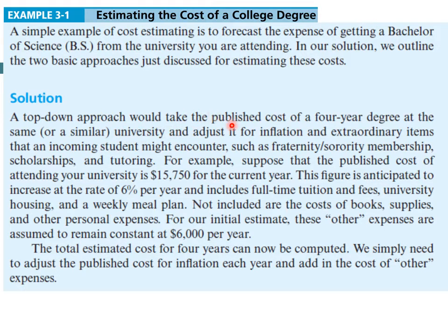Okay, and when you obtain these, you cannot use them directly for the future. If it is for another university, you have to adjust it for your own university. For example, if the cost of SQU is not available, maybe you can take a university in the United Arab Emirates.